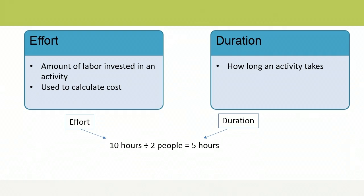It's important to understand the difference between duration and effort when estimating resources. Effort is the amount of labor, or total number of billable hours, invested in an activity because of the resources involved, and is used when calculating costs. Duration is how long an activity is expected to take with the labor available. For example, unloading a truck may take 10 hours with one person, and only 5 hours if two people are assigned. If resources are increased by adding more labor, the duration of the activity is decreased.